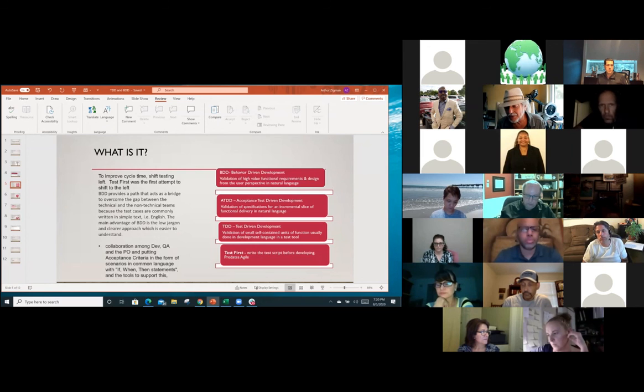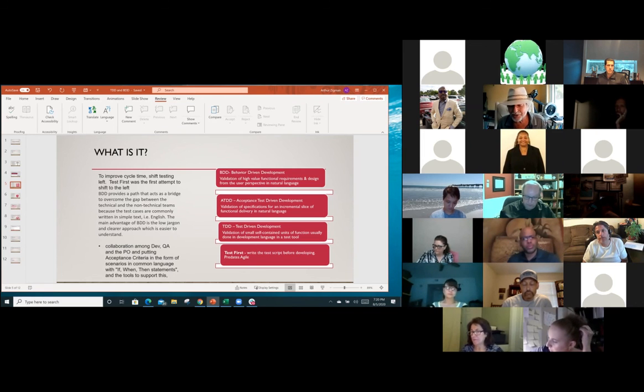One exercise I did with the team to get to test first was just get the team together and say, let's take a look at your cycle time as a team. You're going through this process and now you're getting over here, you get stuck because you got all these developers throwing out code and you only got one tester. So you finished all the code and it's taken you 3 weeks to get the darn code deployed. So let's flow that out on a wall, and you put down where the cycle time is going, and you tell me how you can solve that problem, and let the team come up with the idea of test first.